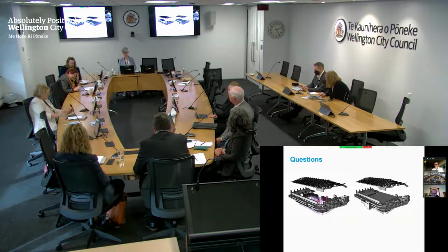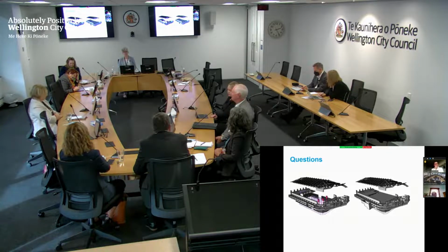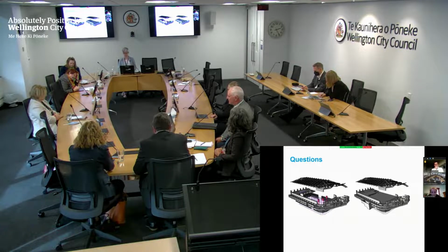We have a large component of this project as a fixed price, albeit that's subject to cost fluctuation, but it would have been anyway. I think if we'd had ECI, it would have been very difficult to have subcontractors pricing the project at an early stage with less than detailed design information. That's what I figured, which is why I asked the question.